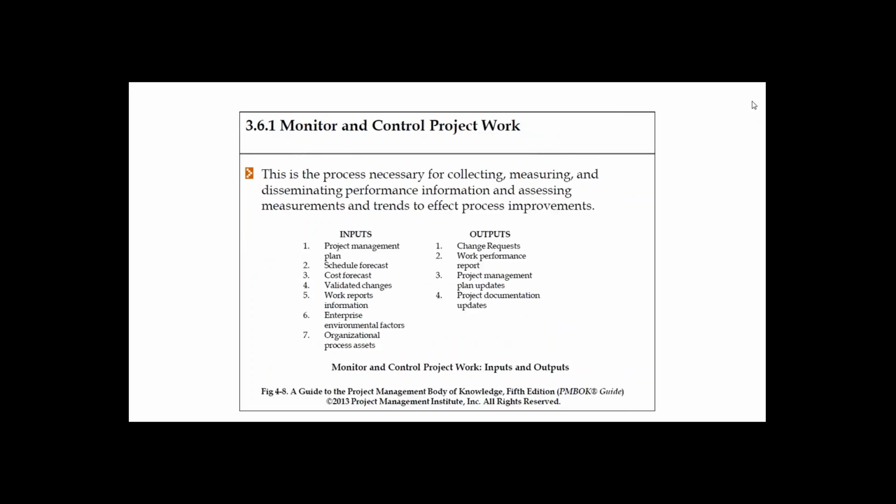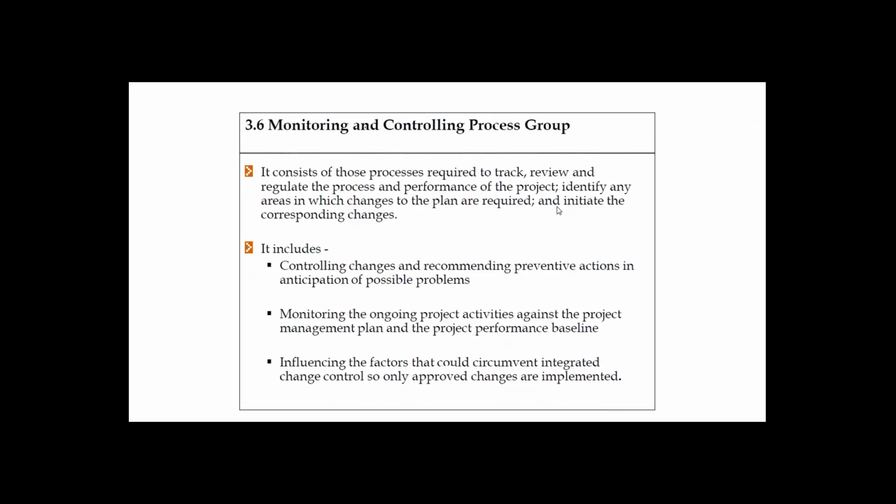Let's say if we want to understand the schedule, from the project baseline, when we say this project is going to start on a particular date and end on a particular date, but if there is any deviation, any variance, 10% or 20%, we can see at the end of the project, when we do the lessons learned, or even in the middle of the project, what the deviation is, not only in terms of the schedule but also in terms of the other parameters.